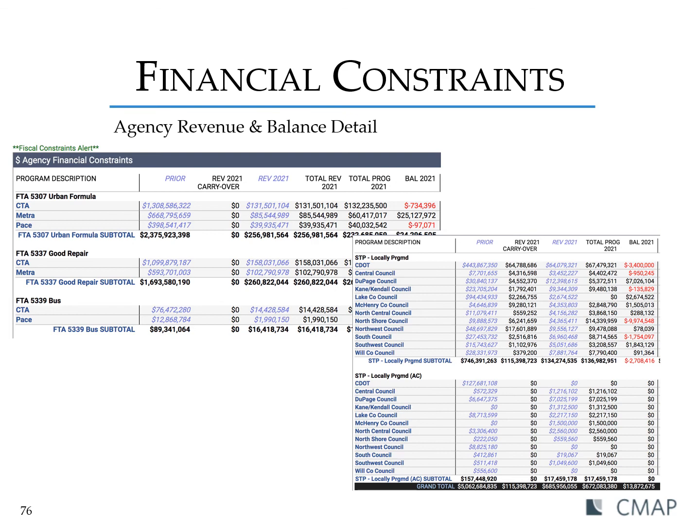What you really want to watch out for in these reports are the values in red. This indicates that the program is not financially constrained and potentially indicates that something has been entered or updated incorrectly. We suggest running this report anytime you make major or multiple changes to ensure that everything has remained within budget. You'll notice that on the top left here, it's giving you a note that says Fiscal Constraints Alert.